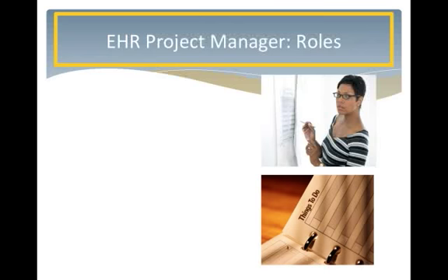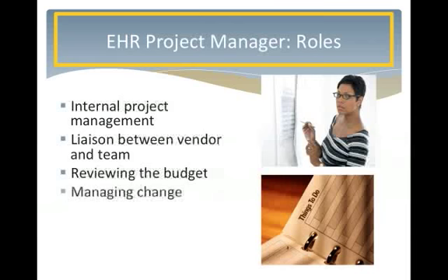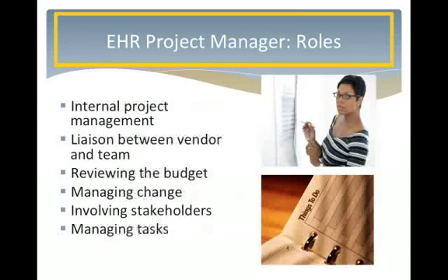My responsibilities include managing the implementation project locally at the health center, bridging communication between our health center control network, our implementation team, and sometimes various HIT vendors, keeping track of the budget to ensure we are appropriately using our funds for the EHR and other technologies, helping the organization address any change management issues, giving status updates to all stakeholders, and carefully monitoring the implementation plan and making sure tasks get completed on time.